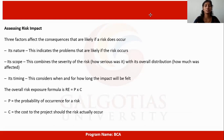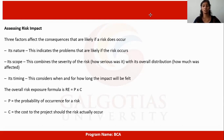Three factors affect the consequences if a risk occurs. Its nature — the problems that are likely if the risk occurs. Its scope — combines the severity of the risk with its overall distribution, i.e., how much is affected. Its timing — considers when and how long the impact will be felt. The overall risk exposure formula is RE = P × C, where P is the probability of the risk occurring and C is the cost should the risk actually occur.